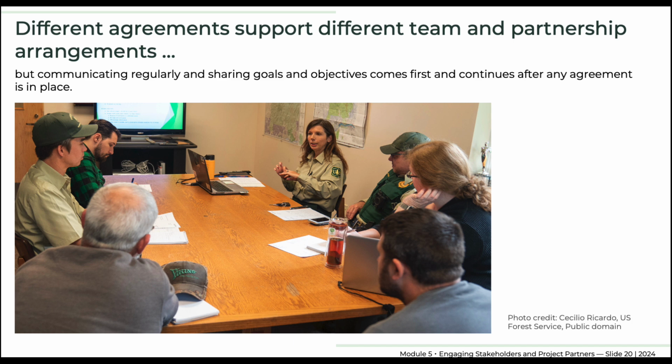If the project primarily benefits your agency and no cost sharing is anticipated, it may be a procurement. If the project is of mutual benefit to your agency and a non-federal party, and if there is an exchange of something of value that meets the purpose of both parties, it may be a partnership agreement. If the project serves a public good and meets the intent of a specified assistance authority, then it may be a grant or cooperative agreement.